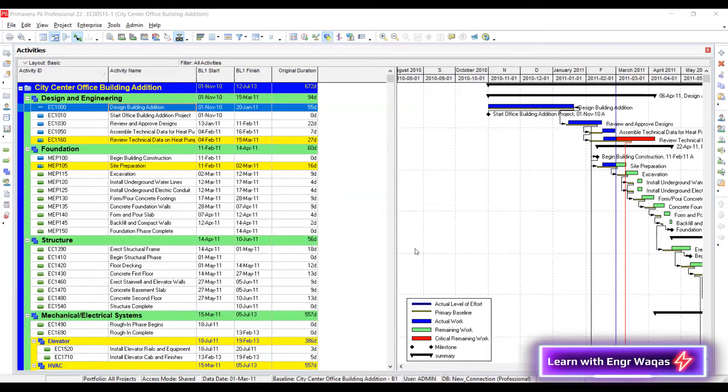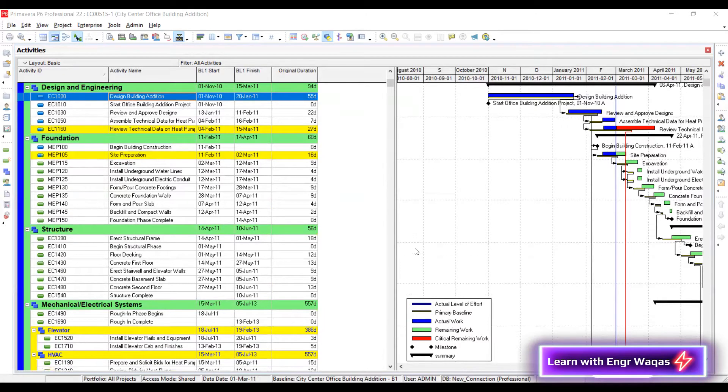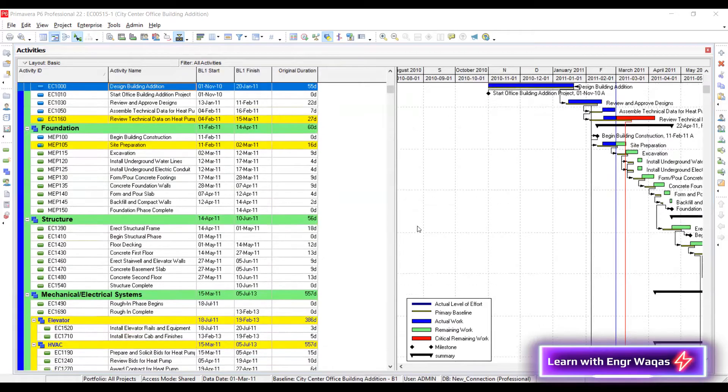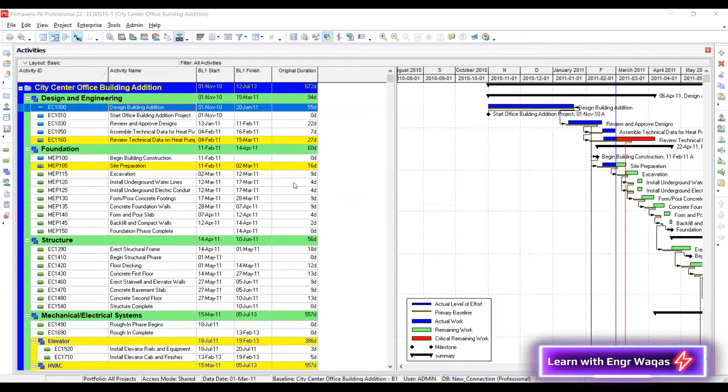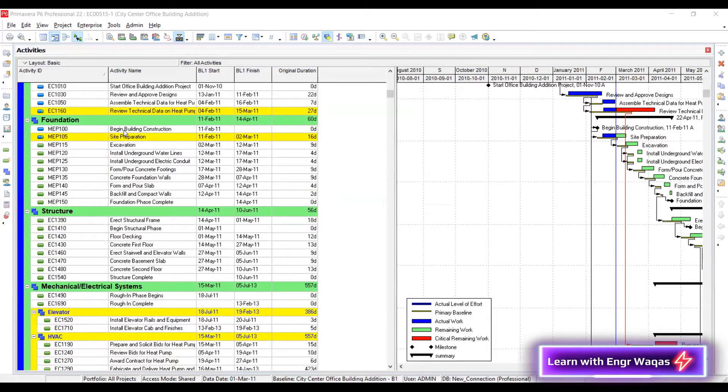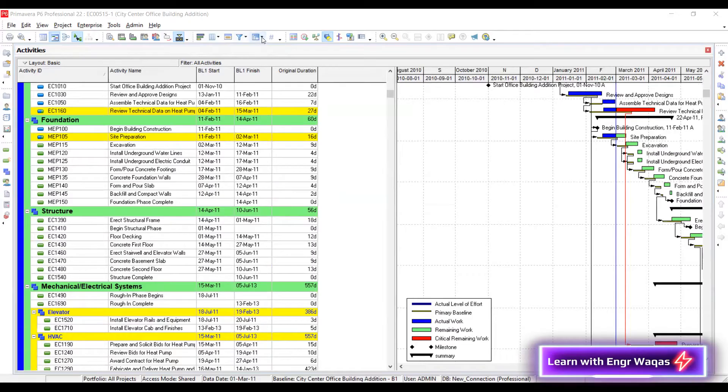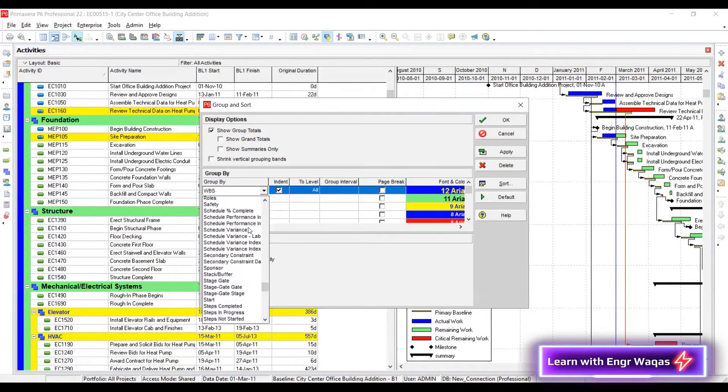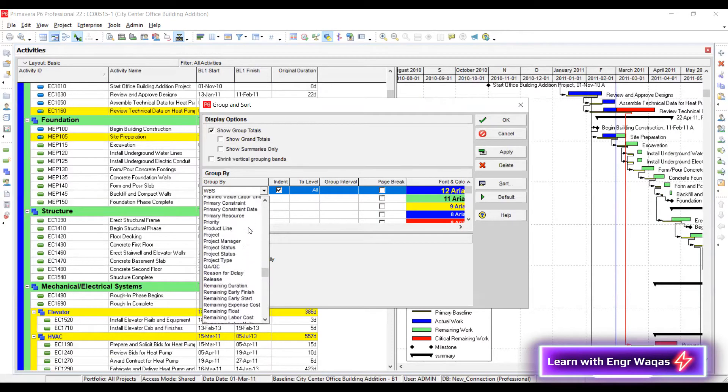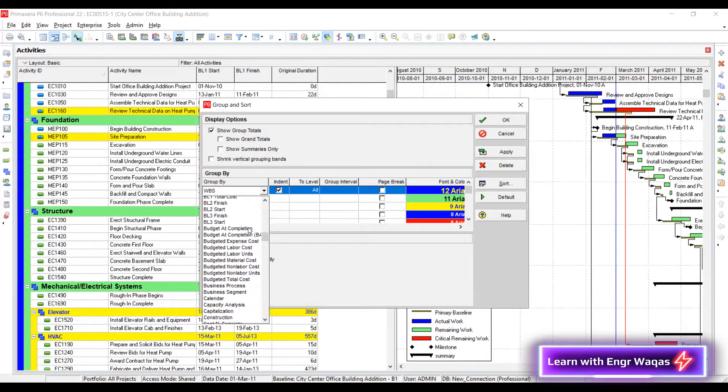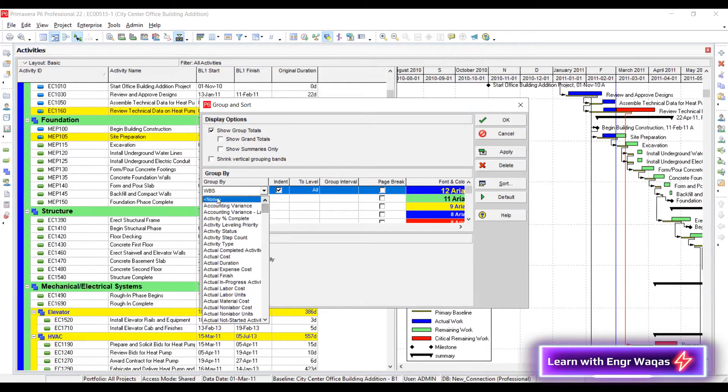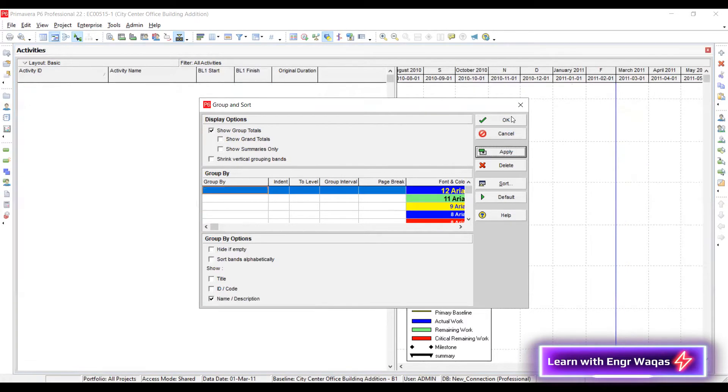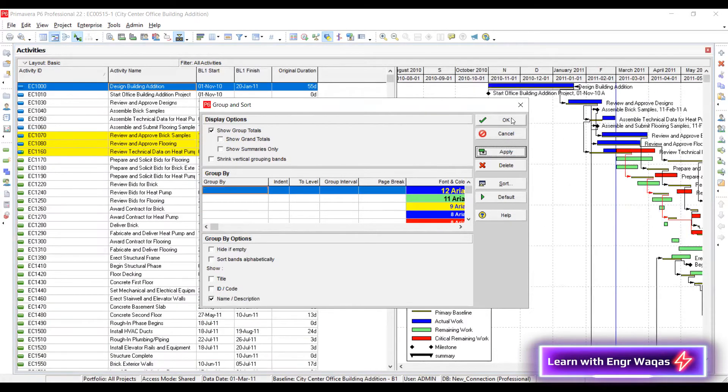So here we go. This is my project. First of all, I need to convert this project into a single line project. Now I have defined my project in WBS breakdown, so I have to use my group and sort by feature which is given on top of here. Just click on this and just check over here WBS level one. I have to remove it. Either I have to go for none. See, here is none option. I don't want any categorization. Apply. Now my project is a single unit. There is no WBS.